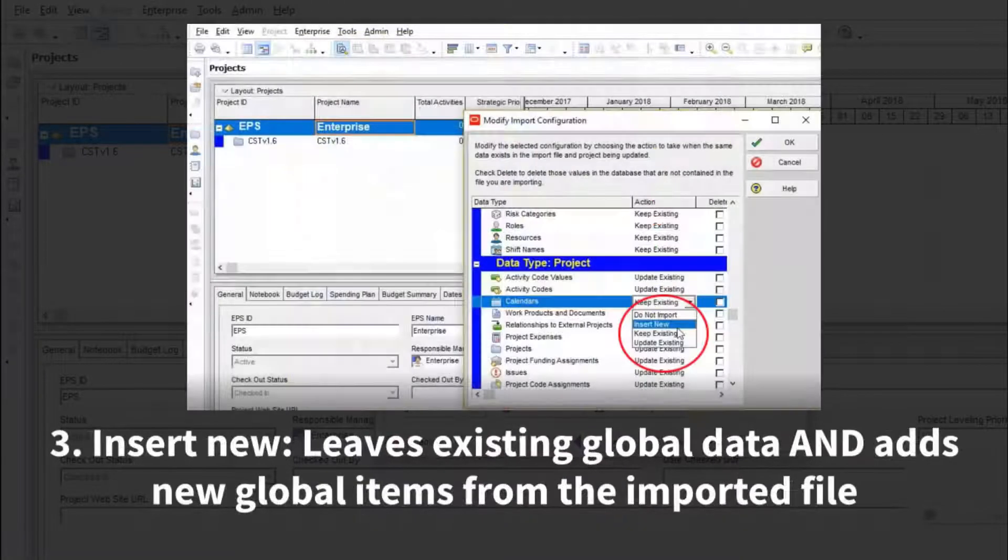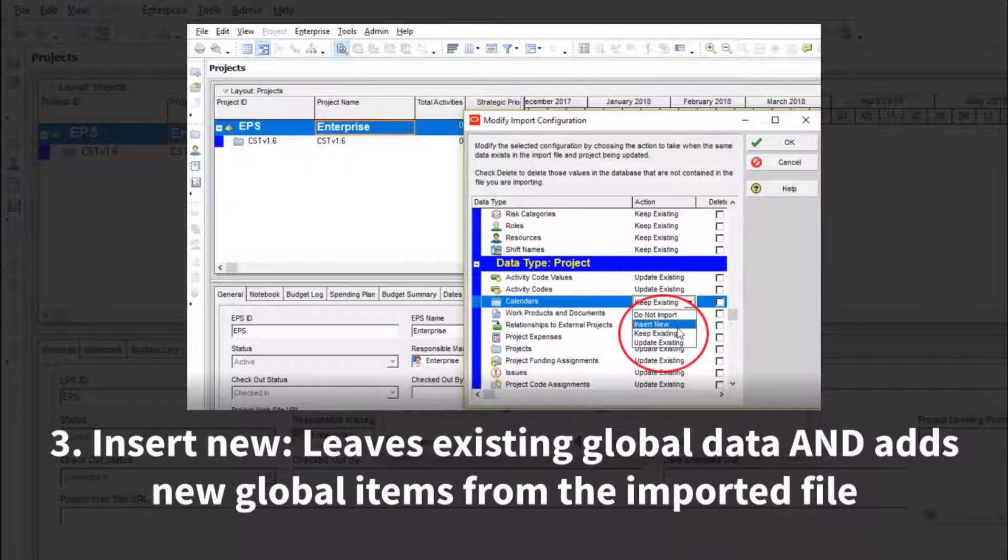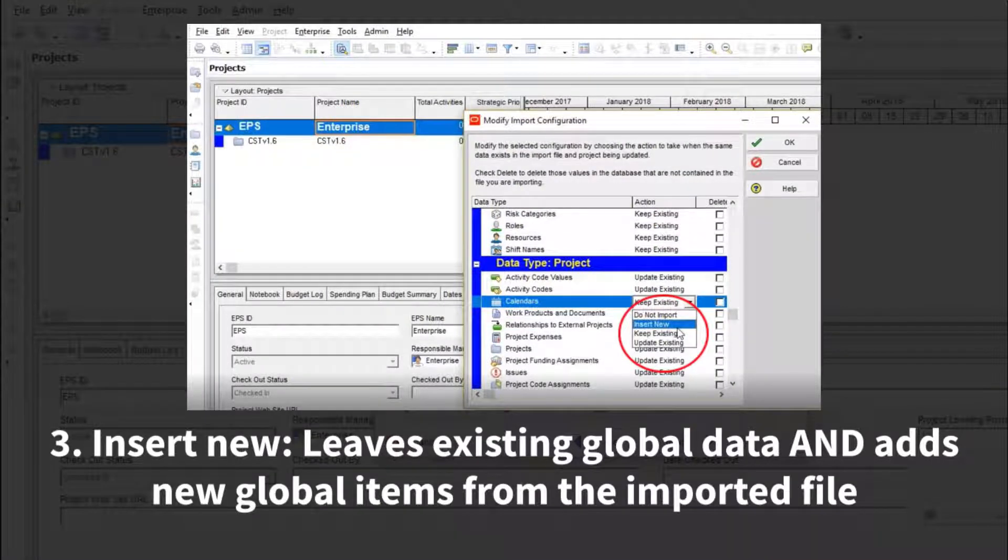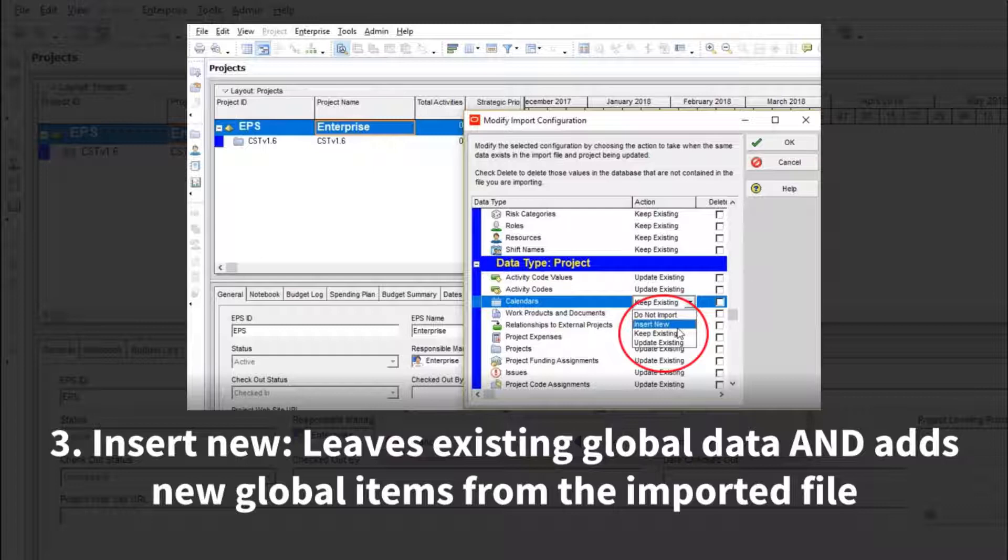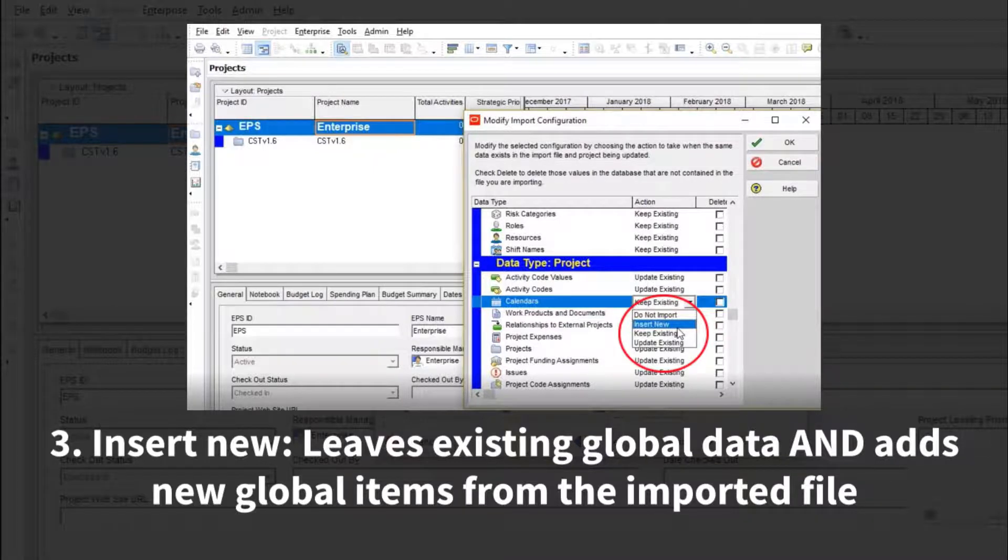There is an option when importing to create new global calendars in your database without overwriting your existing globals. This is good for preserving all data while still seeing the dates intended, but it can start to clog up your calendar list very quickly if you do this for more and more projects.